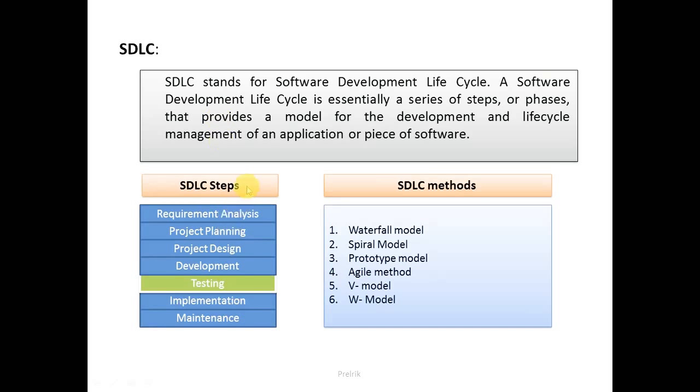So these are the phases of SDLC, and now we'll see what an SDLC model is. The waterfall model is a very old and ancient development model, and it's basically a sequential model. What is sequential? It's a sequence. First requirement analysis will happen, then project planning, then project designing, then development, testing, implementation, maintenance. So it's a sequence, one by one.